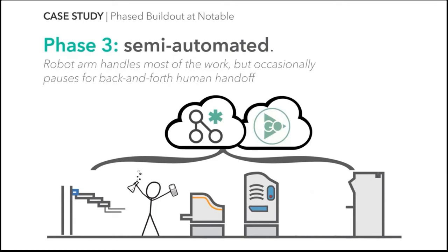And there's a few good reasons to have a semi-automated work cell like this. For example, you may not have all the instruments you need in-house yet. They could be expensive. You could be building up a justification to purchase them. You may have already purchased them, but you might be waiting for them to come in. Some instruments can have lead times of up to 3 months. And in that situation, it doesn't make sense to wait for 3 months for that instrument to come in. You should automate what you can with what you have now.